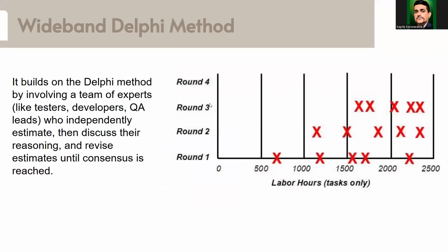So I will mention what Wideband Delphi is. Wideband Delphi is a method that we use with a large team, like testers, developers, QA leads, QA engineers, and PMs. If we have a large team, we will individually ask everybody to derive an estimation. And in the first round, we will ask everybody to show their estimation.